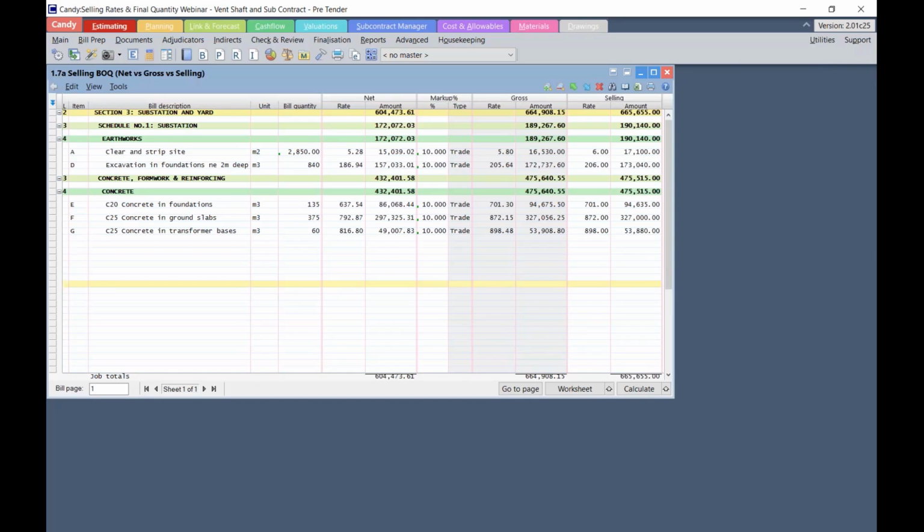Please take note of the following concerns when rounding off. Seeing that the rounding off of the rates is based on the 4 to 5 rule, the decimalization between 0 and 0.5 will be rounded down, meaning that the value will be reduced. This could result in large reductions where the quantities are high. Always refer to this document layout to highlight these variances, and any adjustments that need to be made must be made in this document to determine the full impact.